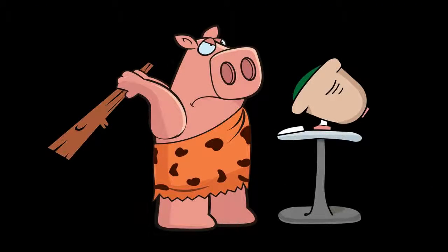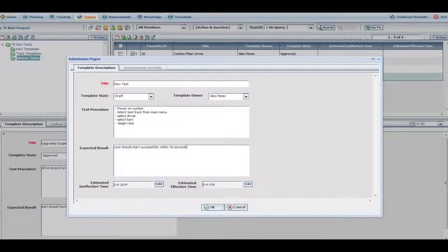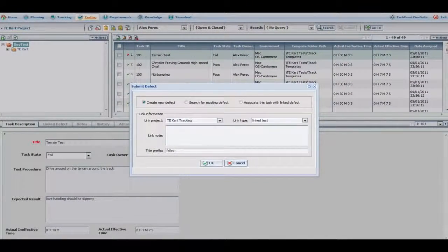Testing takes place immediately after a story is completed. QA teams are commonly tasked with writing test scripts at the beginning of a sprint while a story is being developed. Any defects discovered during a sprint should be addressed immediately. However, in the real world, lower priority defects are often moved into the backlog for prioritization.